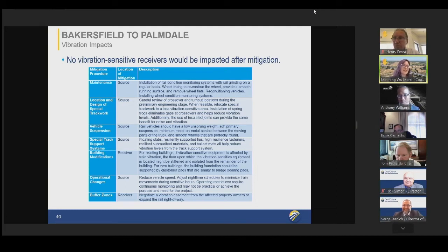I just actually wanted to add that in the mitigation monitoring and enforcement plan, that is Attachment C of the ROD in your board packet, there is a schedule and a time frame of when we must finish, when we must commit and when we must undertake these measures, including when we must report out. So for example, with relocation, which is the EPA mitigation relocation measure, the reporting schedule is we must report out before acquisitions.